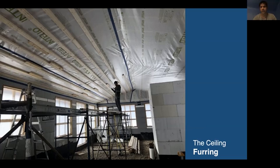And so, of course, when the inspector pokes their head in, they see the second row of measurement tapes that stick out, and they're wondering why it's such a narrow number. And you have to go backwards and explain there's almost 3 feet of insulation in the center there. And then below the membrane, it's got the blue lines. If you look around the perimeter and down the center, it's a higher tech tape that, in combination with a schmancy caulk, the goop, sticks the edge of the membrane to the ICF, and then we taped over that.